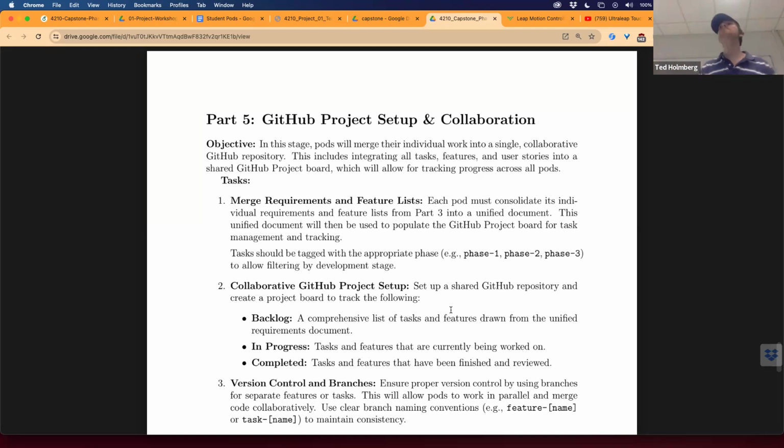We'll also probably start doing digital stand-ups. If for any reason a pod hits an obstacle, and there's the expectation that in 2 weeks they get something done but they're still not done, then we have to come together and talk about what the obstacle was that caused the delay and how we can resolve it. We'll talk more about that when we start doing stand-ups and pod to pod communication about where we're all at, with me as well in that process. So again, this will give us the roadmap.